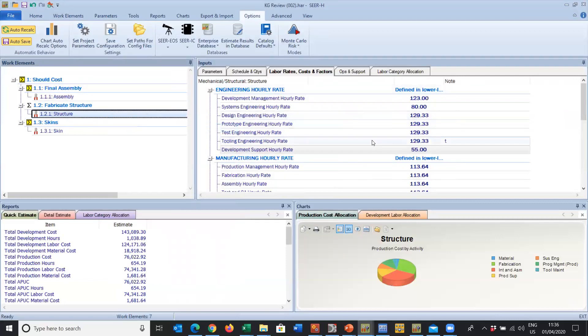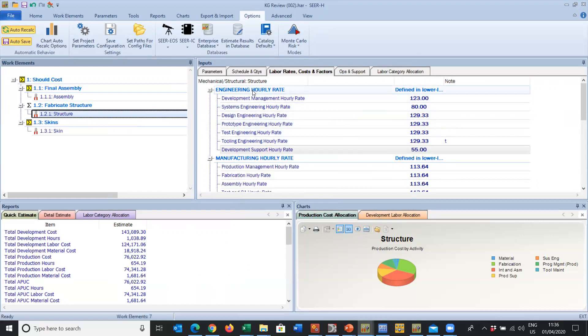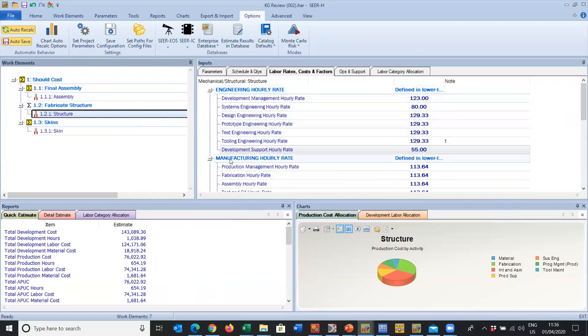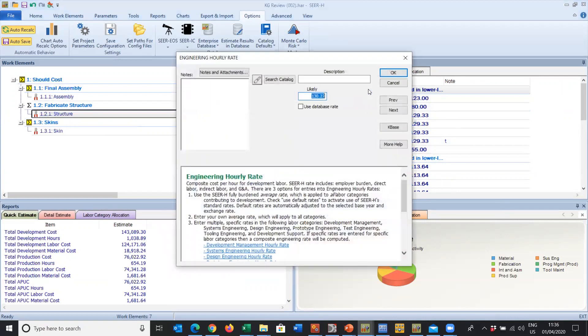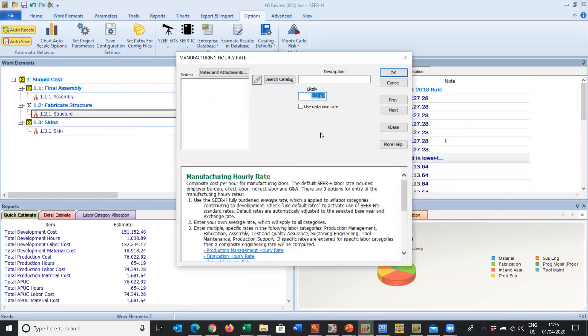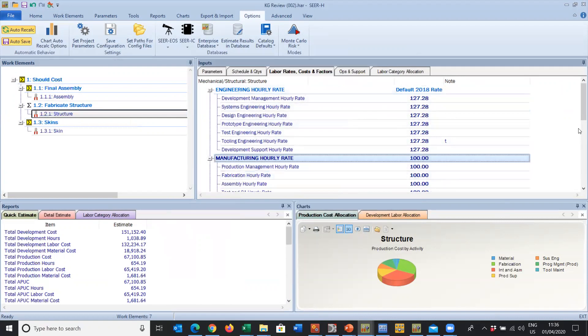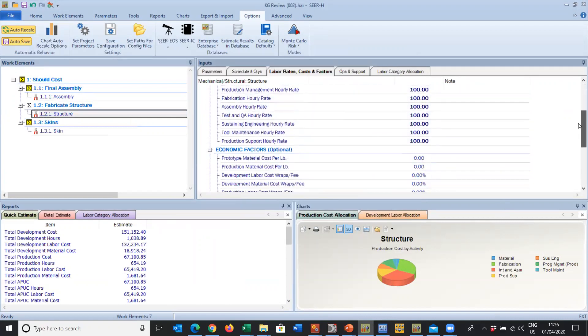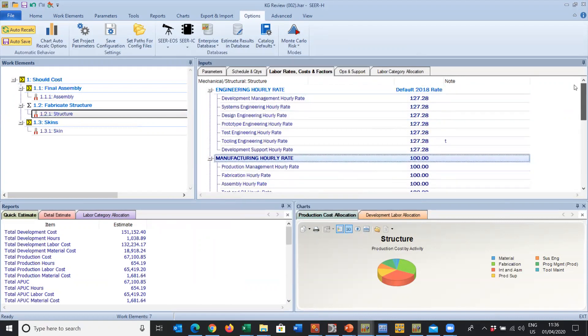If you have a huge WBS, something large, something big, you can use the Change Multiple Work Elements which we'll cover in a minute. While we're here, if all of the labor rates change are the same, then at the top level here where it says Engineering Labor Rate, Manufacturing Labor Rate, you can simply double click there. You can use the database rate or use my own internal rates. That will change the entire range of costs in a single hit.